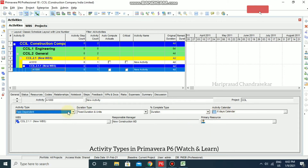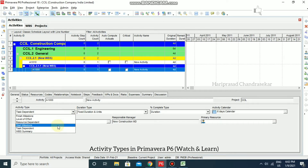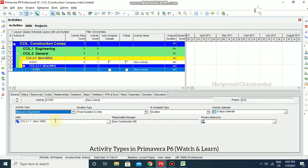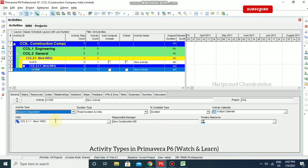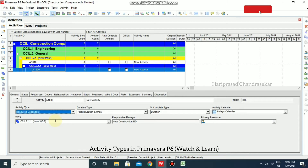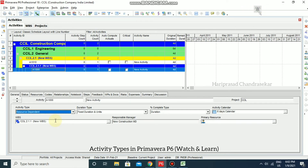The next type is Resource Dependent, which is typically used when multiple resources are assigned to the same activity and the resources can work independently. The activity's resources are scheduled according to the individual resource calendar. The duration is determined by the availability of the resources assigned to work on the activity — it always depends on the resources and their calendars.